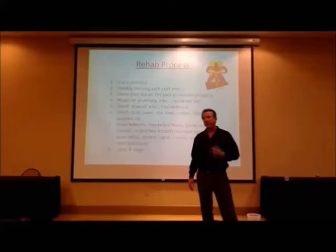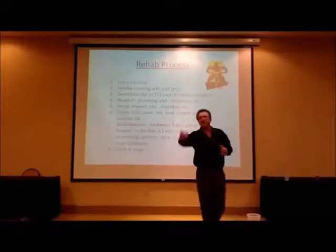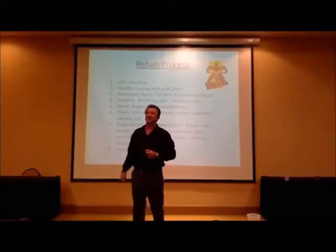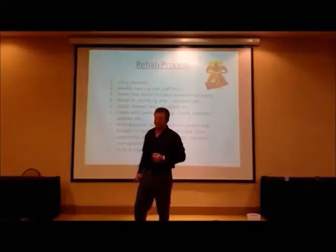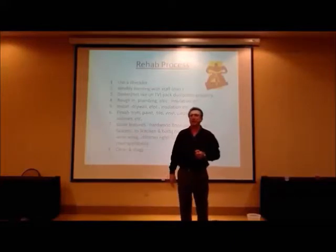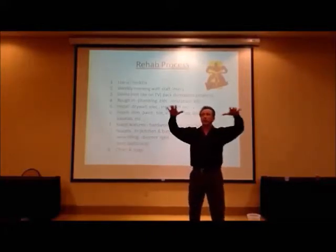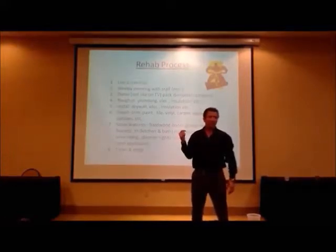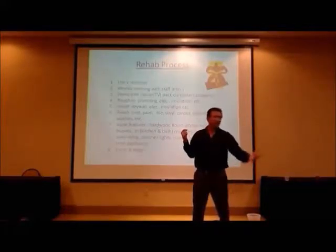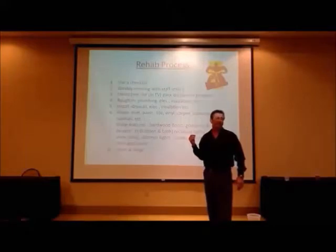Make sure the contractor tells his people to pack that dumpster properly. You may be the one paying for that dumpster. Tell us your story. We started just tossing stuff in, and then the guys came home, they just tossed stuff in, so every other day I would be out there pulling stuff out and jumping and carrying stuff home. We all did that. Don't feel bad, we all did that. So now, before his cabinets go in there, you get a sledgehammer, and you break them up, make them flat, and then you throw them in so that they lay flat, and you can stack a ton of stuff in a dumpster if it's done properly. And dumpsters aren't cheap, right? Those big ones are what, $650? Yeah, and that's if you don't go overweight. You got one sitting out overweight. It's half full of concrete.